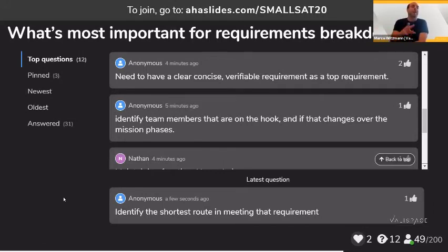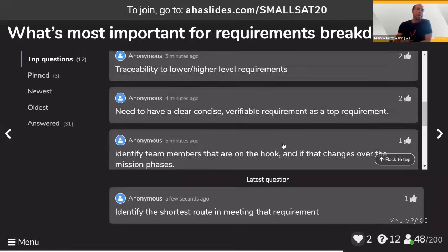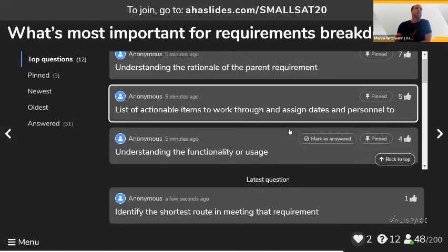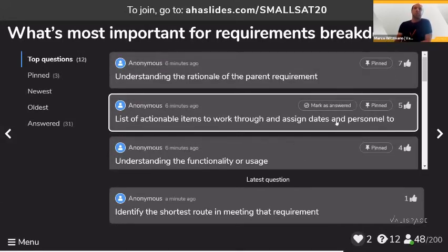And if we had that, then we would probably not have discussed this for, I don't know, probably three quarters of a year. We would rather have been able to have that sit-down and that discussion. So I highly recommend using things like rationales for requirements, giving some extra context, giving some sources. Where does this come from? Does it come from a standard? Does it come from an engineering guess?